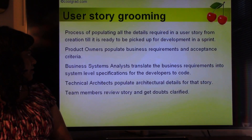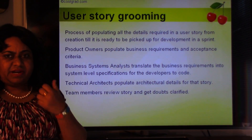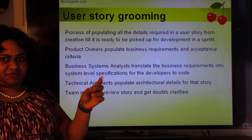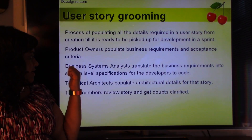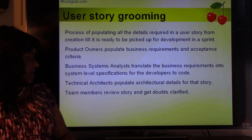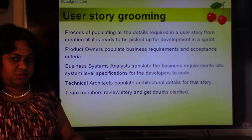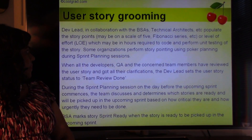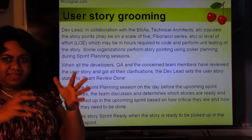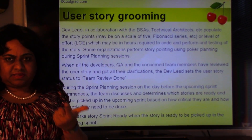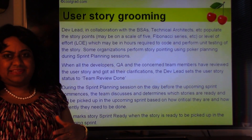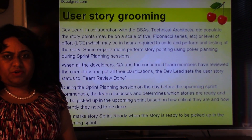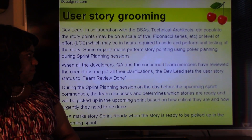What is user story grooming? Grooming is the process of populating all the details into a user story to make it ready to be picked up in a sprint for development. Product owners populate business requirements and acceptance criteria. Business systems analysts translate the business requirements into system-level specifications for developers. Technical architects populate architectural details. Team members review the story and get their doubts clarified. Developer leads, QA leads, and business analysts collaborate to assign the level of effort for each story — in story points or hours.